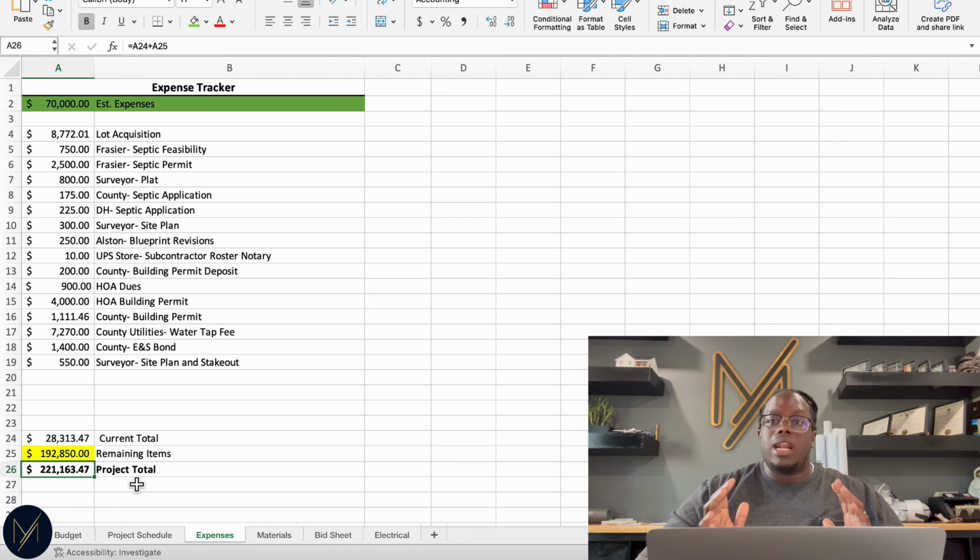So you may be wondering how I got specific costs for my labor on this build project. Simply put, I reached out to different subcontractors and got quotes. Now, I personally like to work with the same subcontractors because we've developed a great working relationship. But when I first got into home building or even construction in general, I had to reach out to different subcontractors and get quotes for the scopes of work that I wanted done.